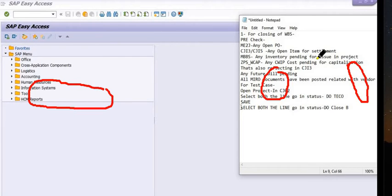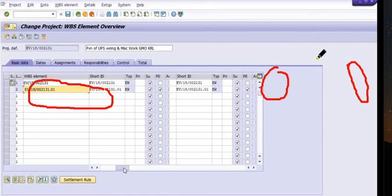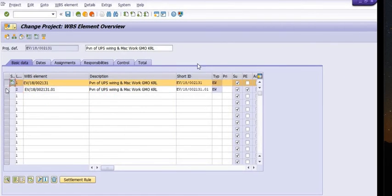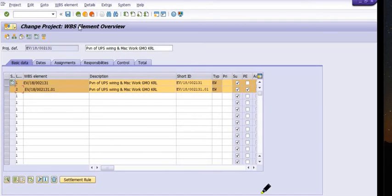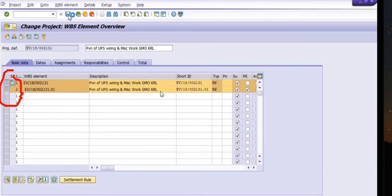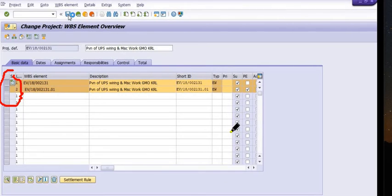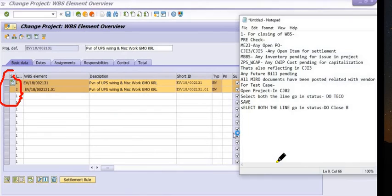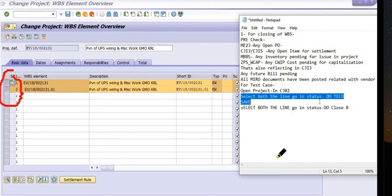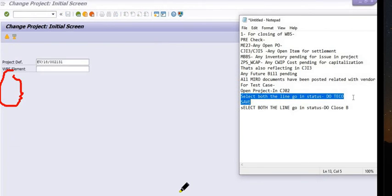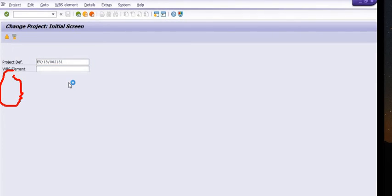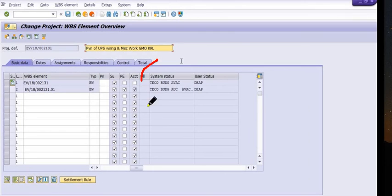No AUC, no project stock, no open line items — all tasks are completed. Now set the TECO status on the WBS. Select both line items and click on Status, then TECO. The system will take some time to process. Once saved, the system status is now TECO.